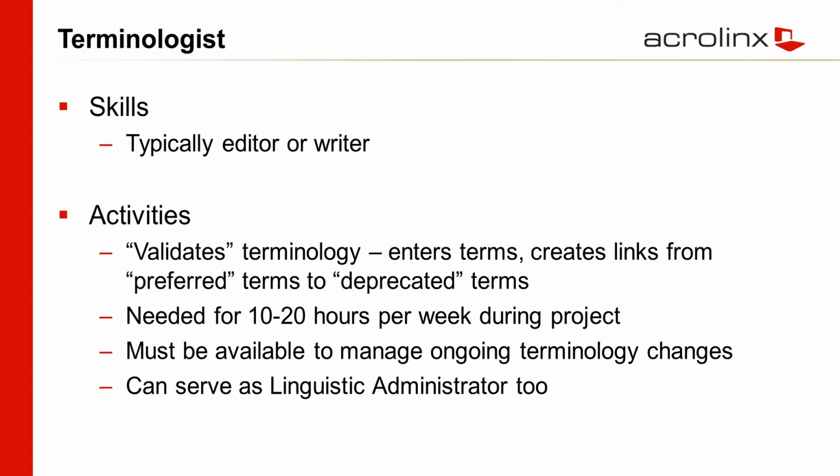Typically, the time expectation for the terminologist during implementation, during this, say, 10 weeks, is about 10 to 20 hours a week. So it's significant. This is one of the most, in fact, the most significant commitment of time on your part in order to get an implementation set up and working well. That's a role that needs to be available on an ongoing basis to manage terminology changes. Terminology is not a set it up and forget it kind of thing. As your company evolves, you will have new terminology that needs to be implemented. Now, this person can also serve in smaller organizations, maybe the linguistic administrator as well.